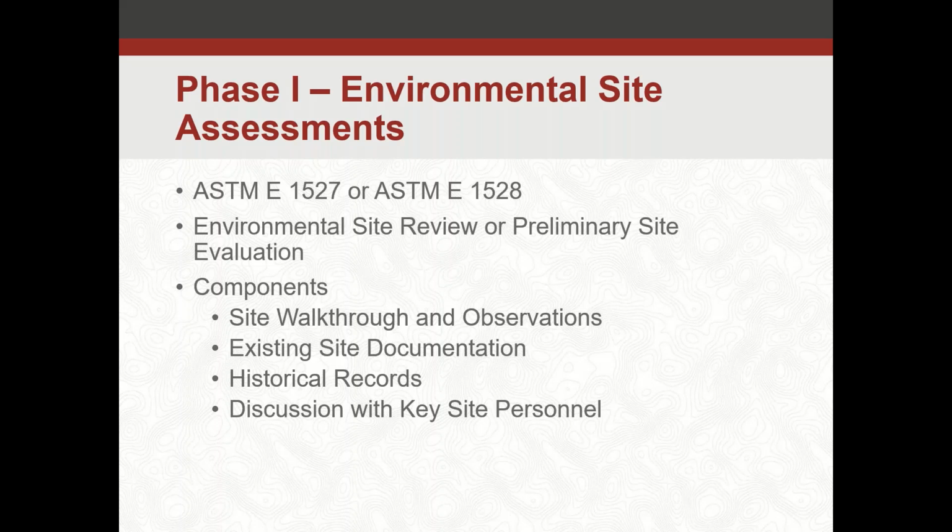You might look at historical documents. Maybe, like I said, you might have past surveys, past reports, or even regulatory agencies. If you search through the local or state or federal environmental records, see what they have on file for the site or nearby properties that might affect the site, and identify those. That'll help you continue on forward with an approach to assess your property.